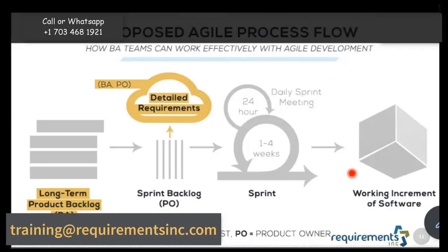You do not have a project manager per se in a Scrum environment, technically speaking. I mean, realistically, that's another story, but there is no role called a project manager. There is no role called a boss. The Scrum team is a Scrum team. Every person is a team member. So if you don't deliver something as promised, let's say, out of these 4 boxes that you took up, you only delivered 3 boxes, right? What happened to the 4th box there? That is very important to discuss in that ceremony called sprint retrospective.